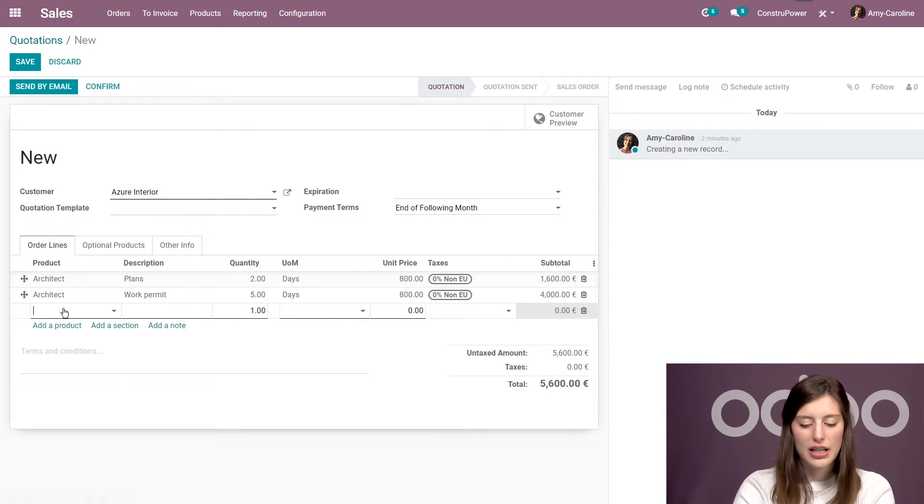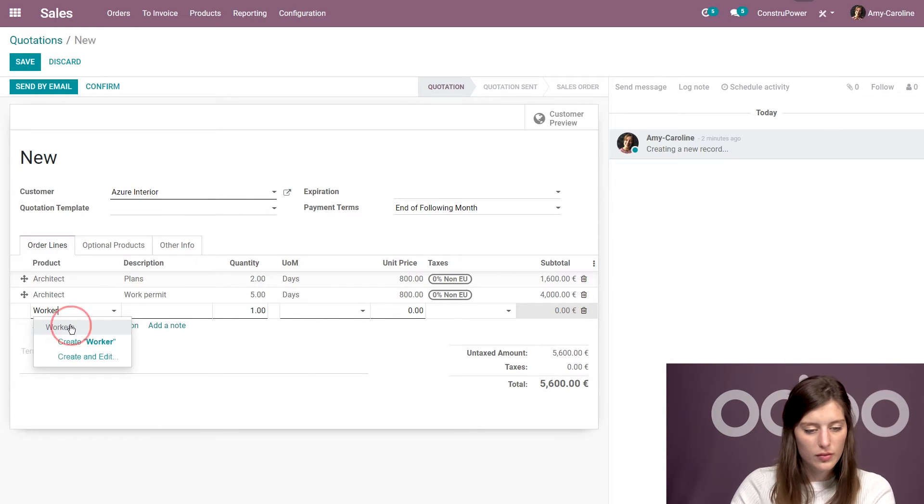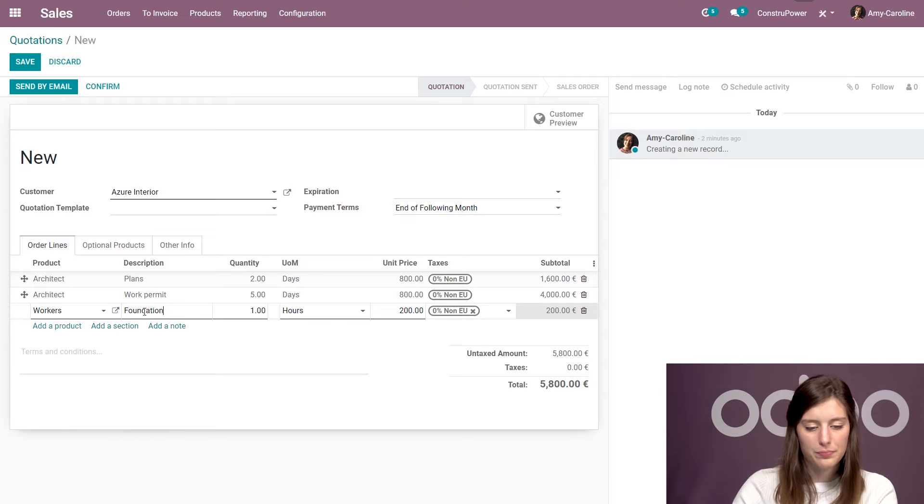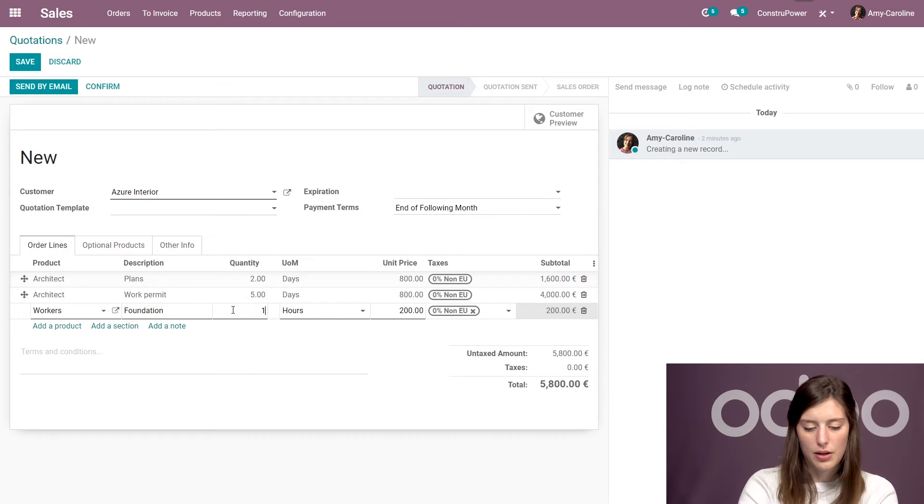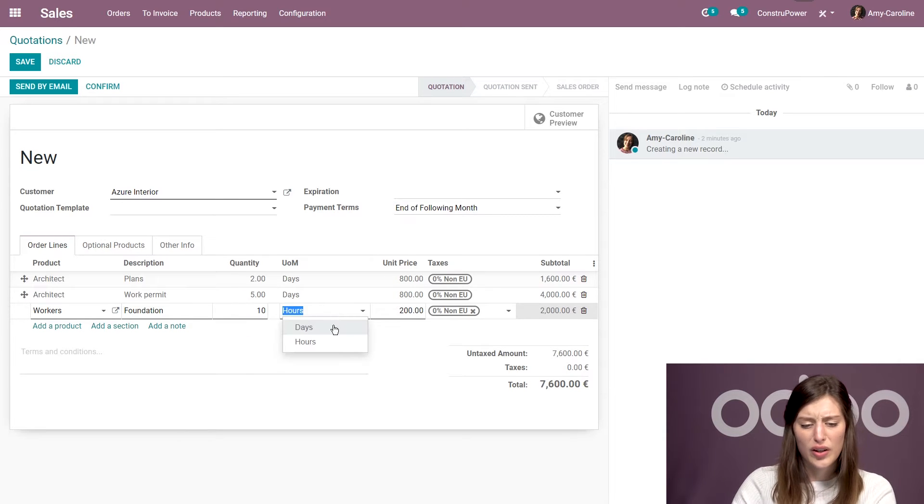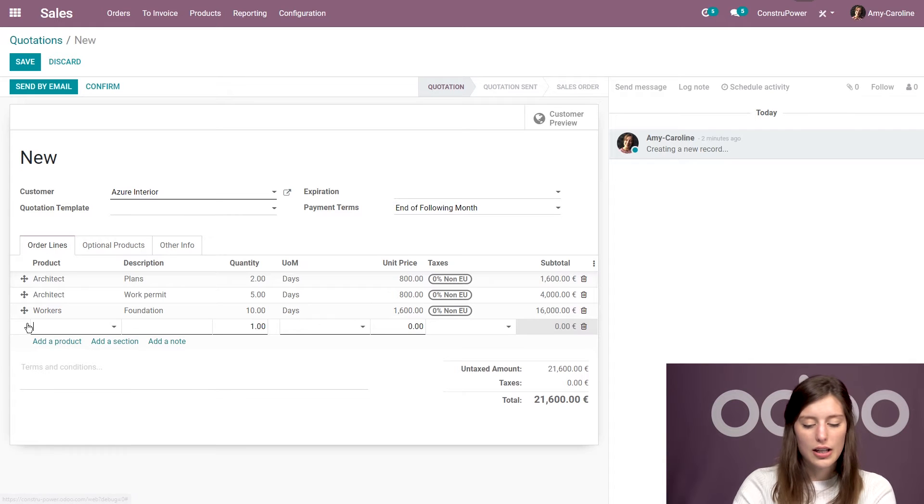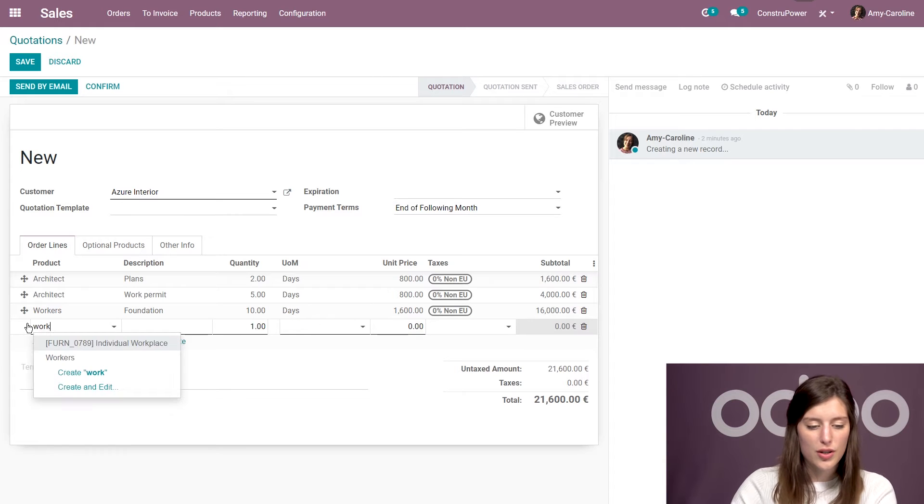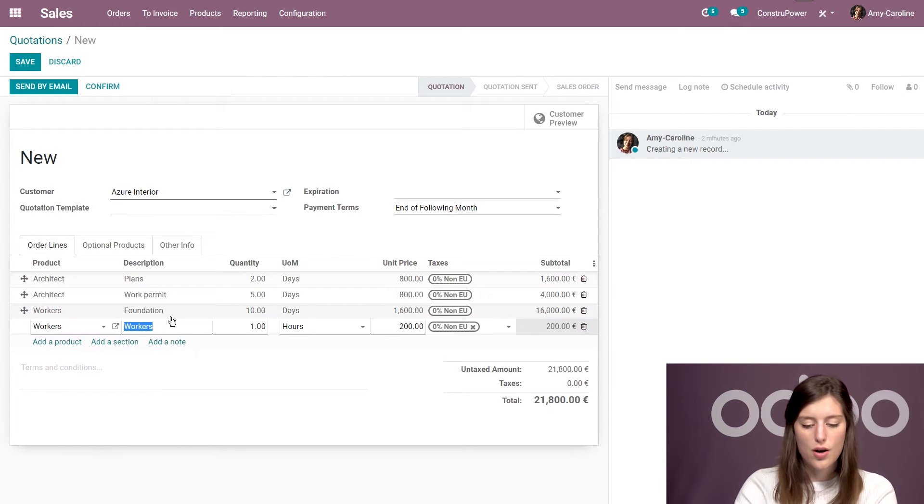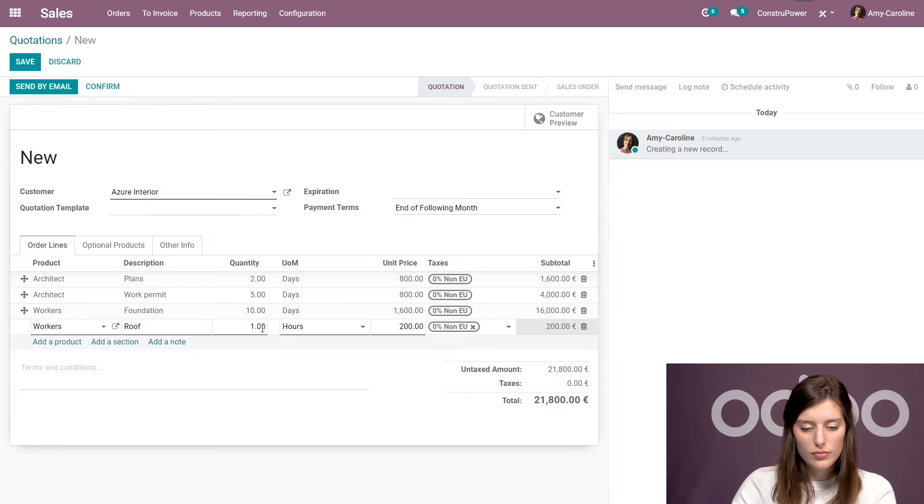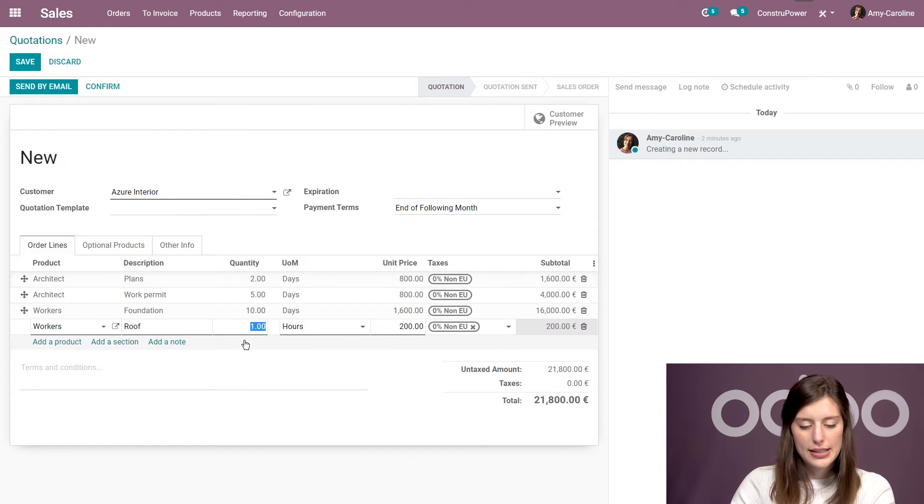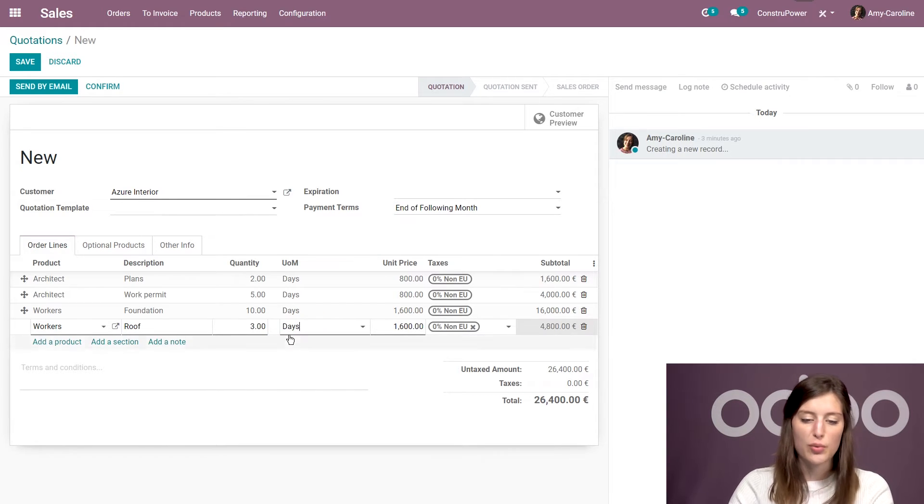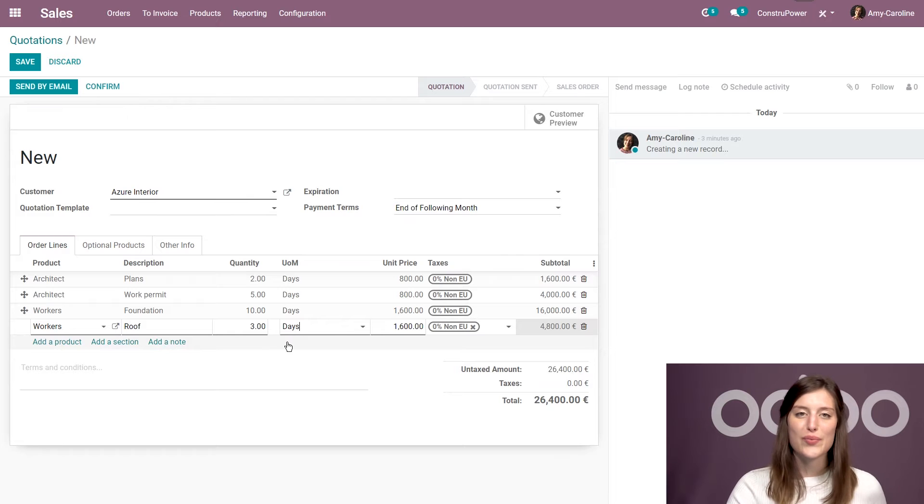All right, now we're going to add some workers who will work on the foundation. And I think that will take about ten days. I want the foundation to be rock solid. I'm going to add some more workers who will work on the roof. And let's say that will take three days. The roof isn't in such terrible condition, so that's fine.